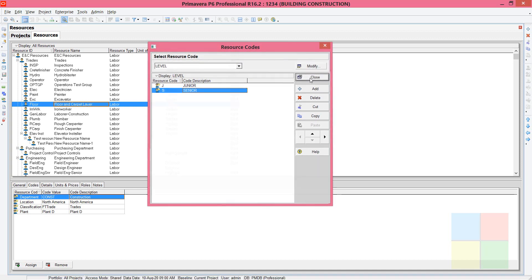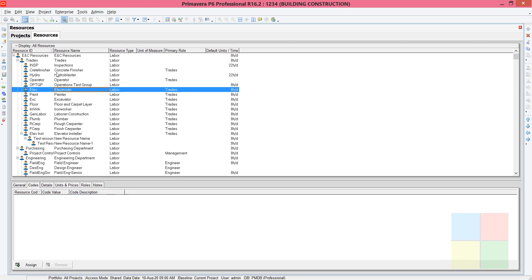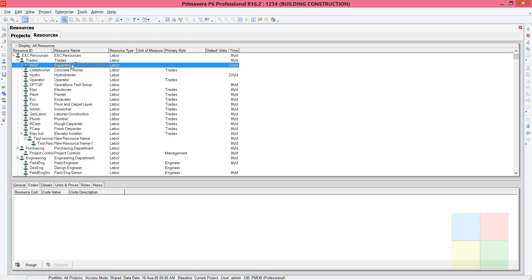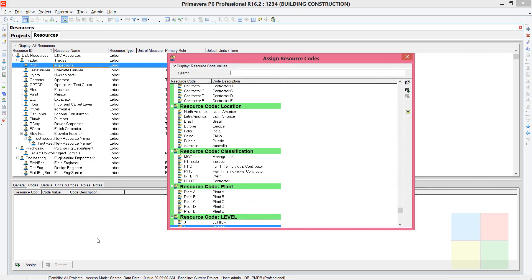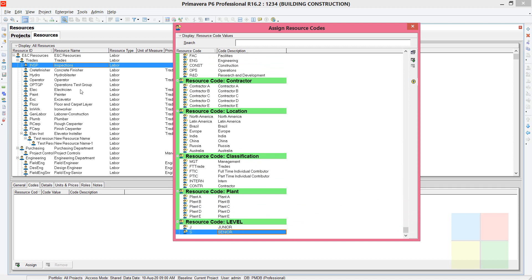Now go to the resource window and add the resource codes. Make sure you can see the Codes option in the Resource Details tab. Highlight a resource — for example, Inspections — then come to Codes in the Resource Details tab and click Assign. As you can see, the Level code is available with values Junior and Senior.